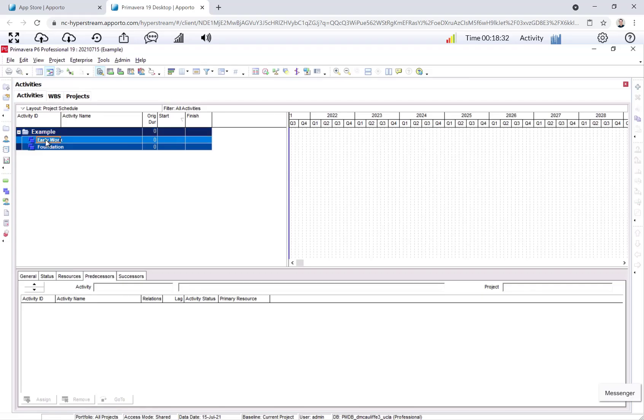Okay, we have our two WBS elements. Let's go ahead and create the schedule now. For early work, I'm going to assign mobilize, deliver piles, excavate, and drive piles. Then I'll use the other six activities for foundation.